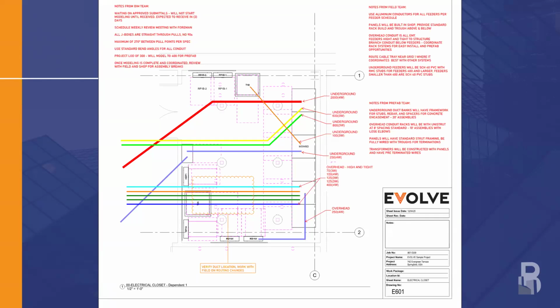Exactly. One of the big pieces that I like to add to my title block is a note that says drawn by and approved by. Right. So at the end of the day, that approved by stamp ultimately isn't coming from you as the coordinator or the drafter. It's coming from the person that's going to install it.